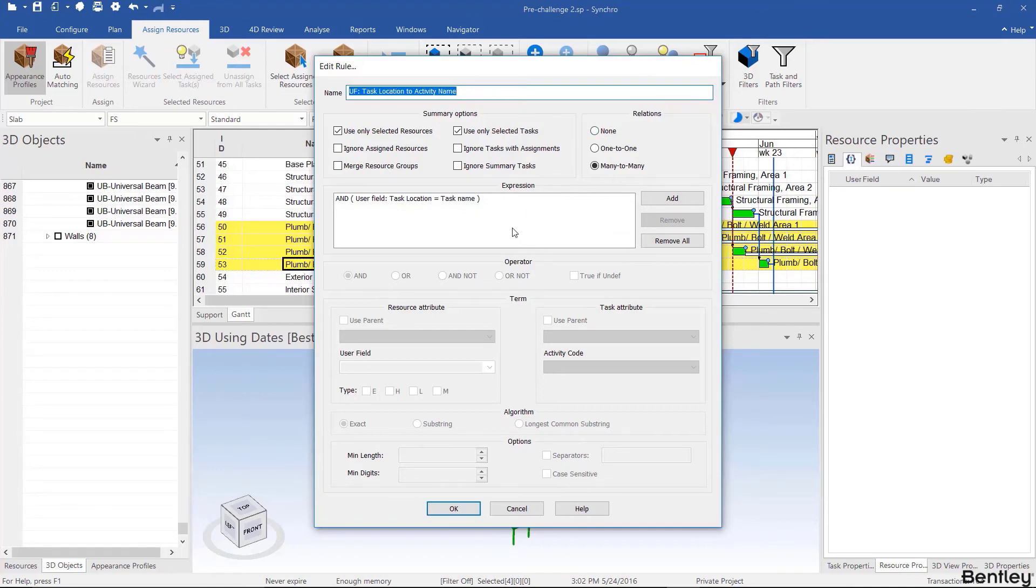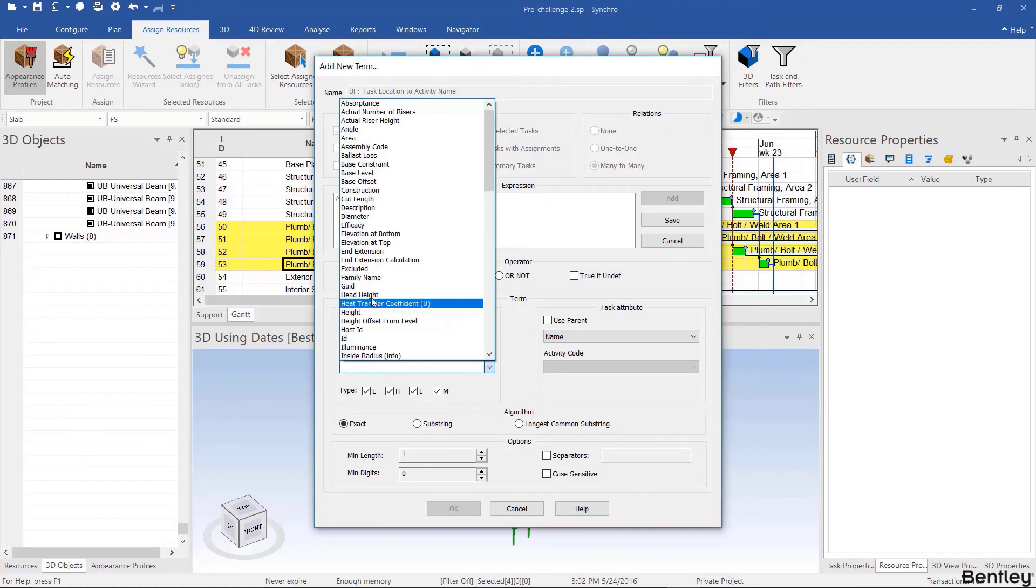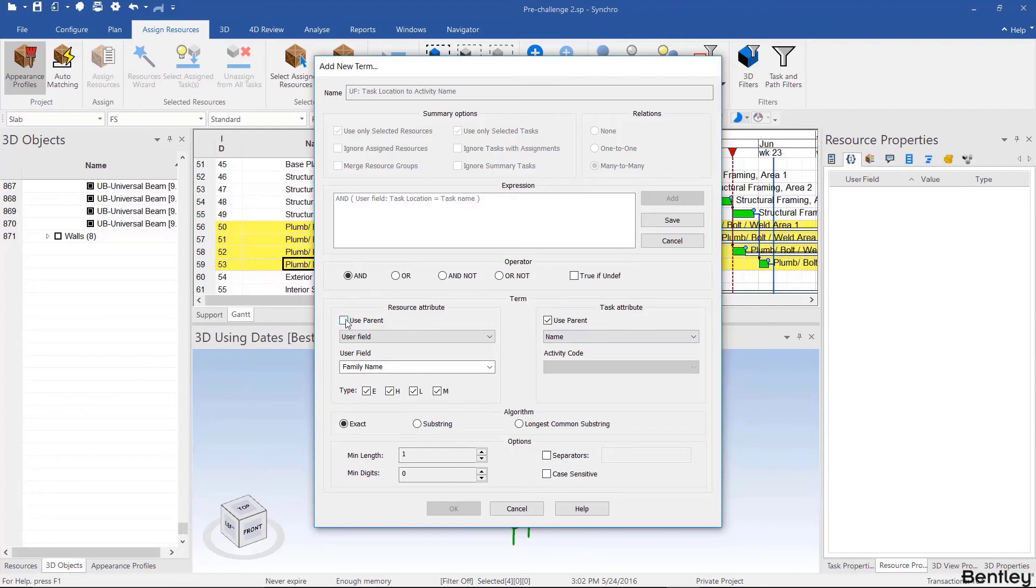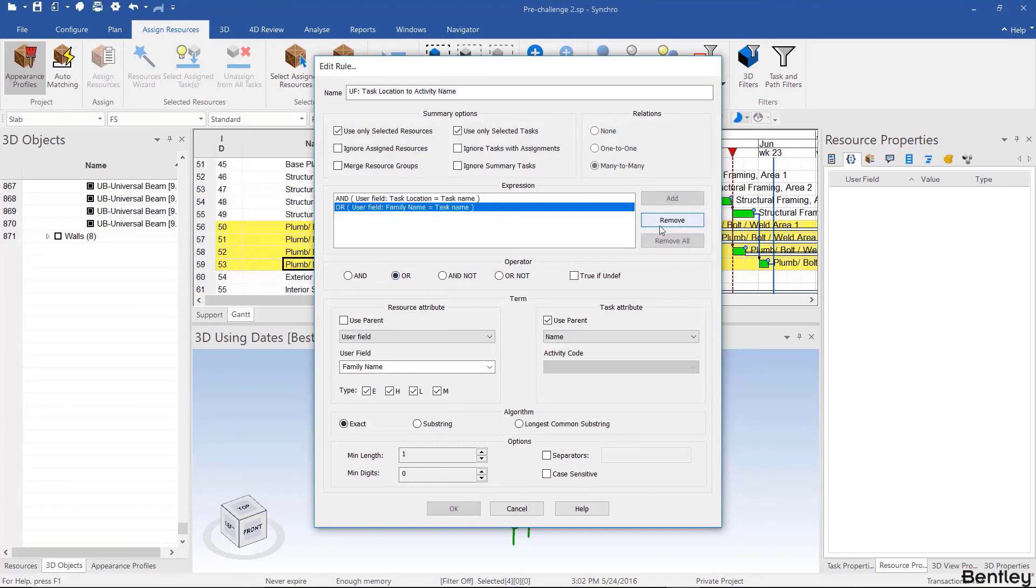You can also ignore summary tasks or merge resource groups. The relations none is used when you want to search and then evaluate if you want to match it or not. You can add more expressions. We don't need to, but let's pretend we do. For example, we're going to auto match the user field family name to the name of the parent. That's how you use parent if you're auto matching to the name of the parent of the activity or the parent of the resources. You use this when you use subdivision a lot. Then you click save and you can specify if this is an AND rule or an OR rule. Then you have to click save again. That's how you create a second expression. I'm going to remove that since we don't need it.